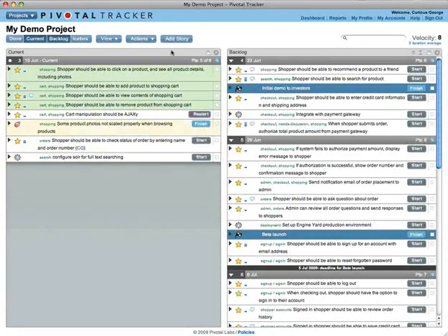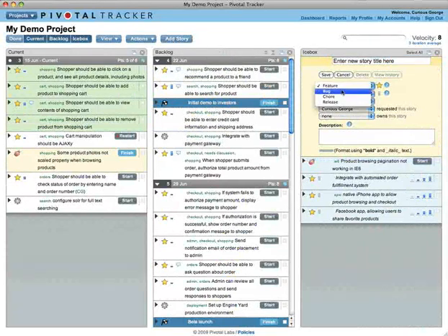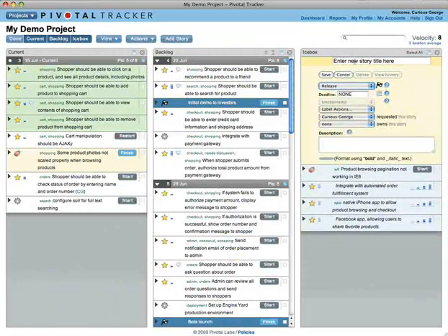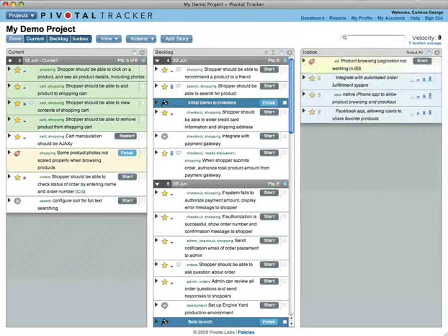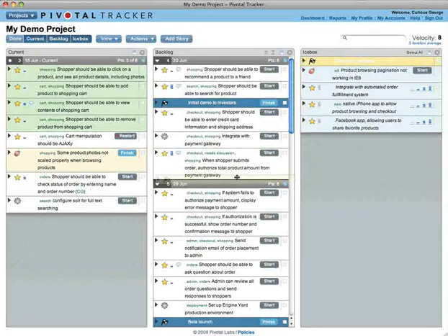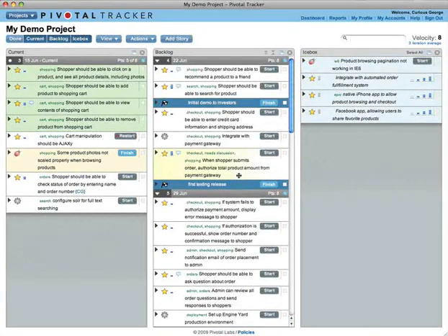Most stories are features, but there are also bugs, chores, and releases. These aren't worth any points, but they help you keep your team apprised of everything that is going on or needs attention. Release markers help you track progress towards your most important milestones.